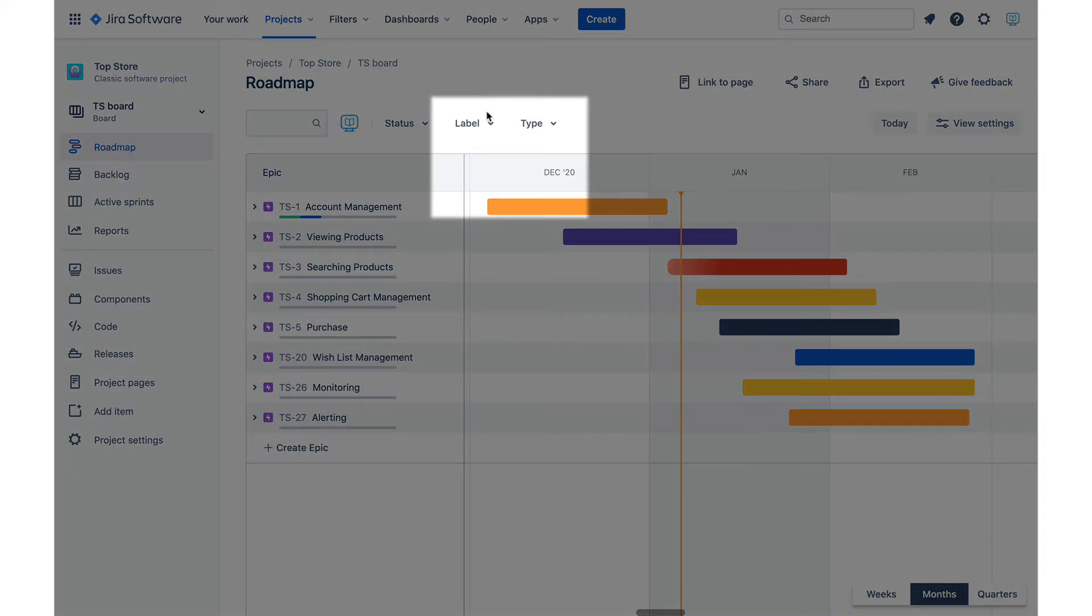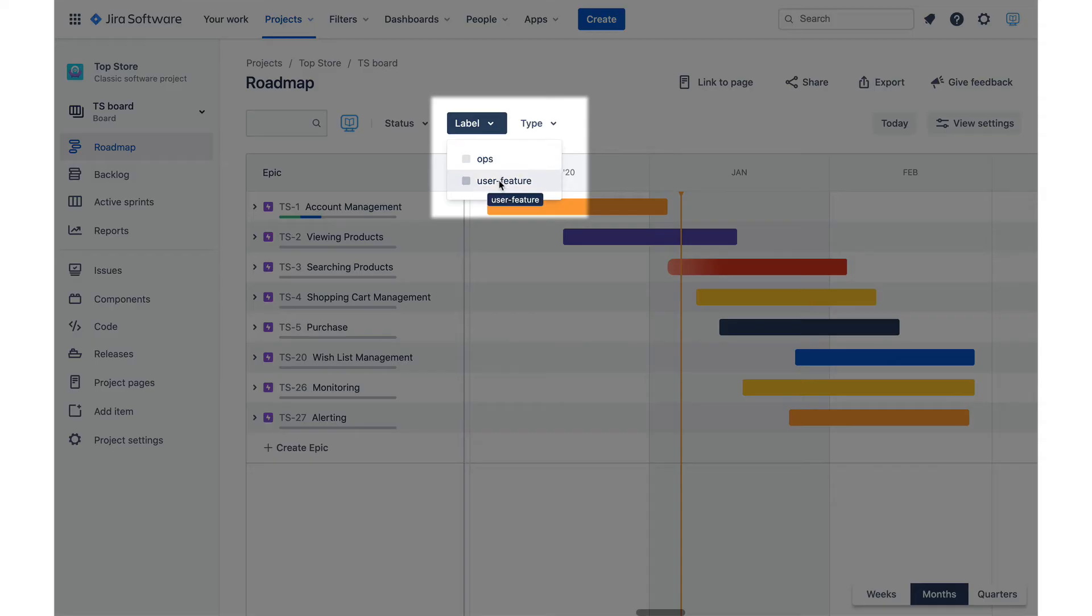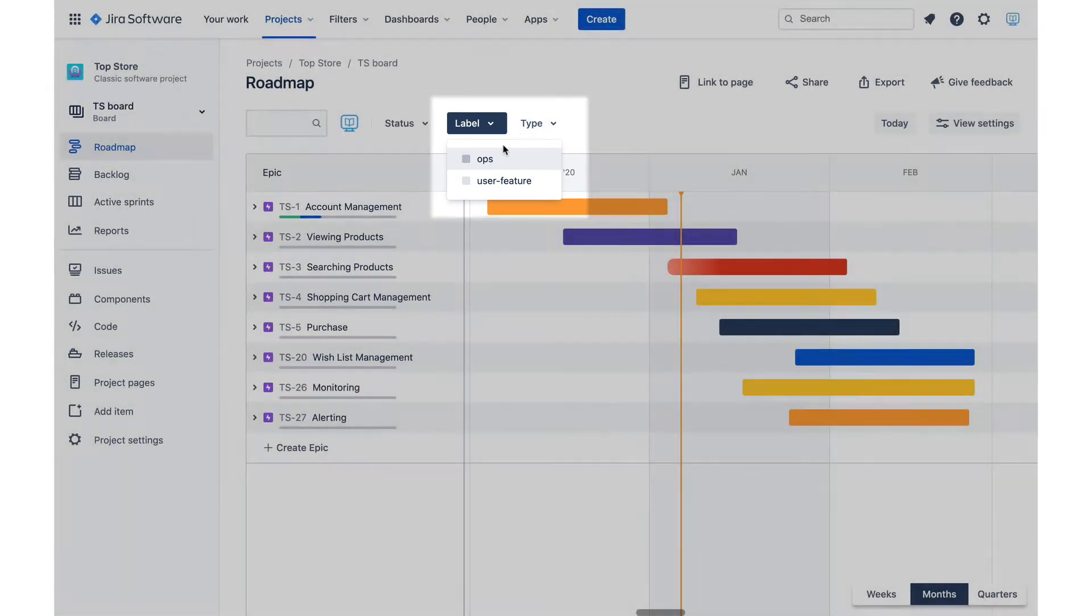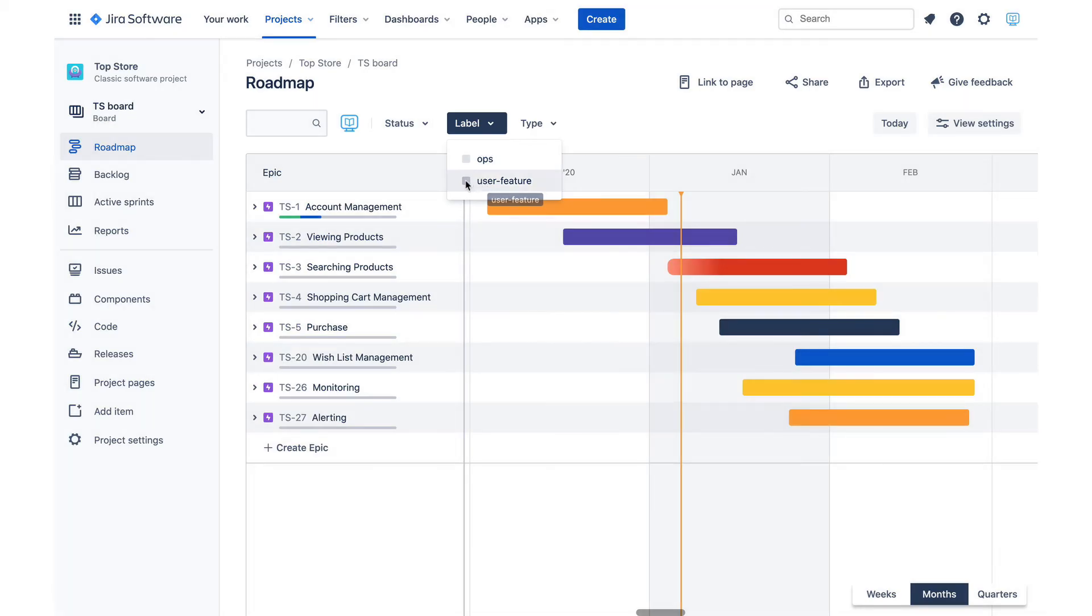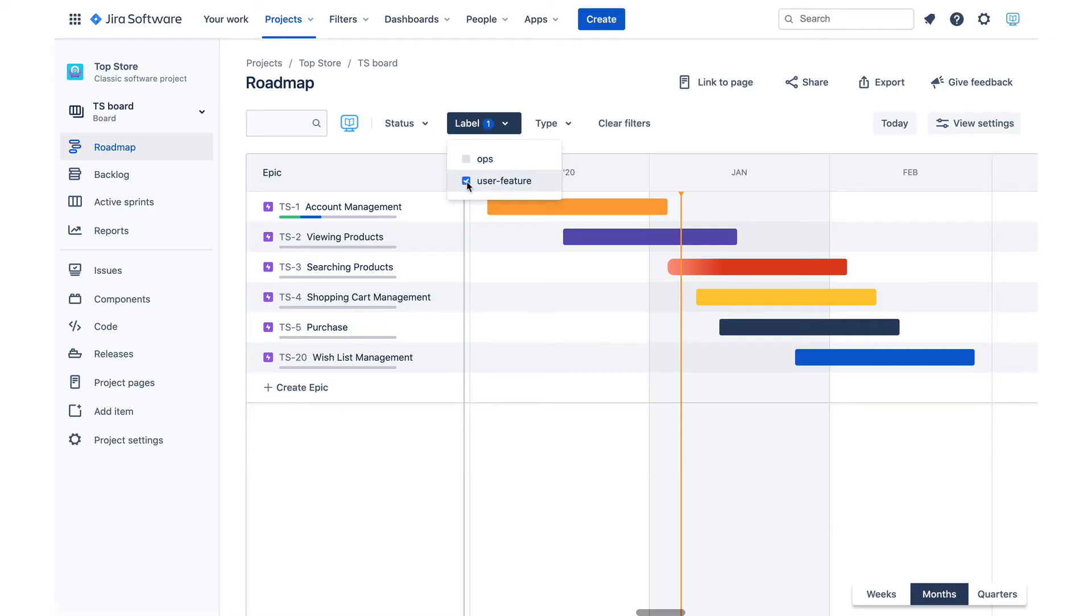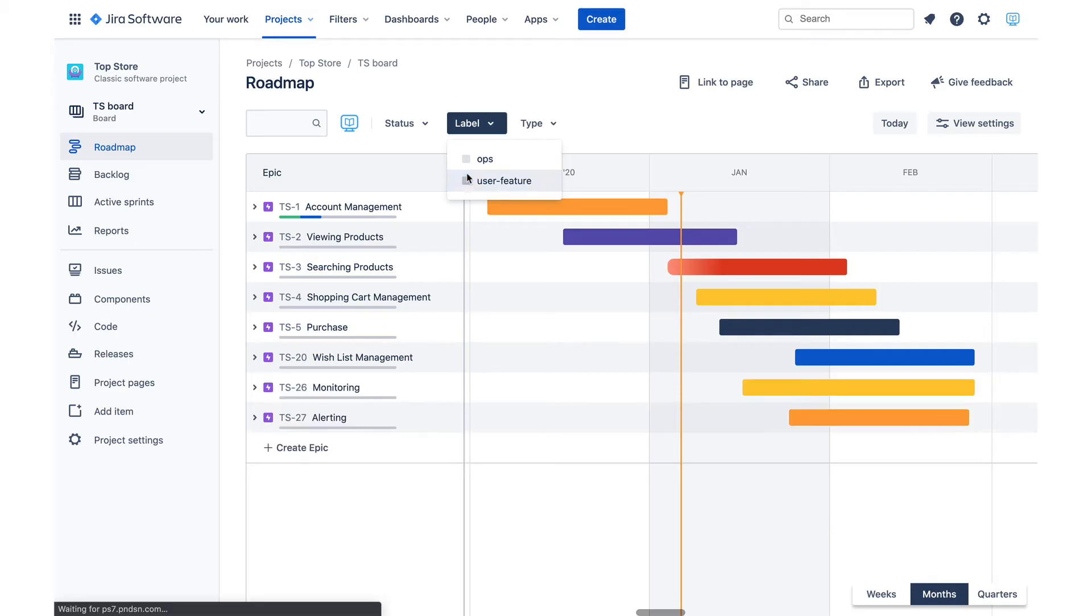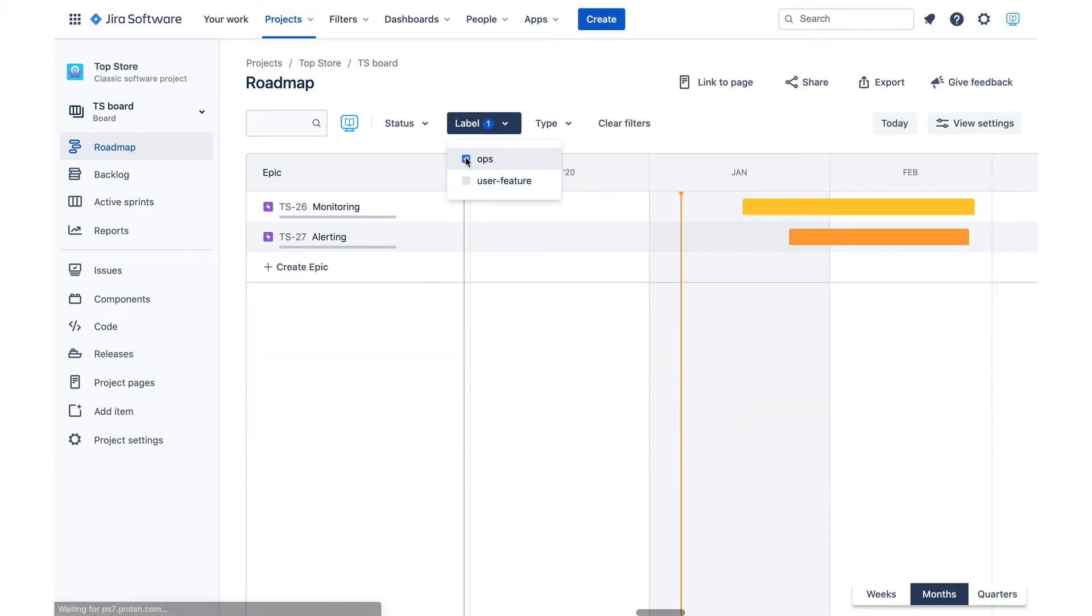Jira Roadmaps addresses this problem by supporting filtering by labels. All epics that support user features are labeled using the user feature label, while operational epics are marked with the ops label. That enables label filter here, which allows us to switch between different views for different audiences quickly. Here is the marketing view and here is the operations view.